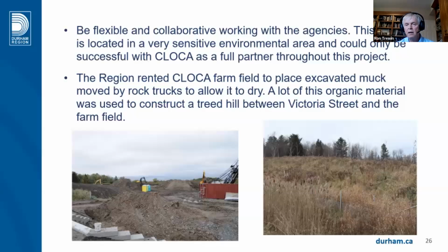on our roads. During our project, we were able to reduce costs further by permanently storing some of the excess material in a berm that was between the farm and us. In the old days, if you looked into the field, you could see deer, so we provided a bit of barrier. We'd plant trees on this, and CLOCA would allow us to save some money by not having to move this excess material.